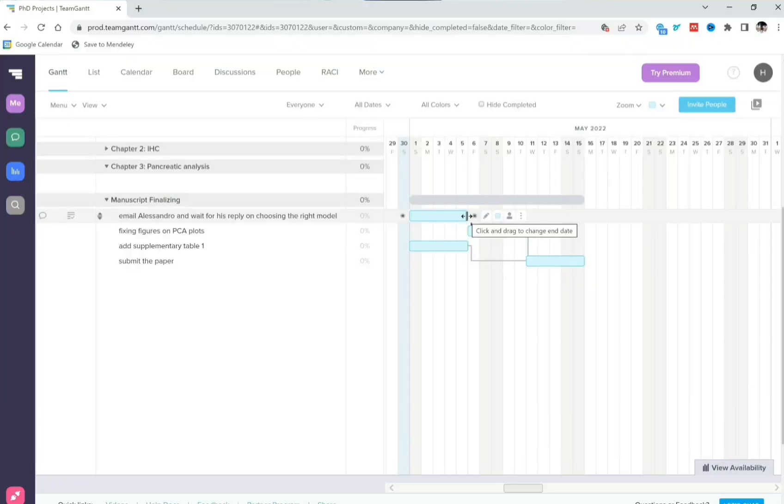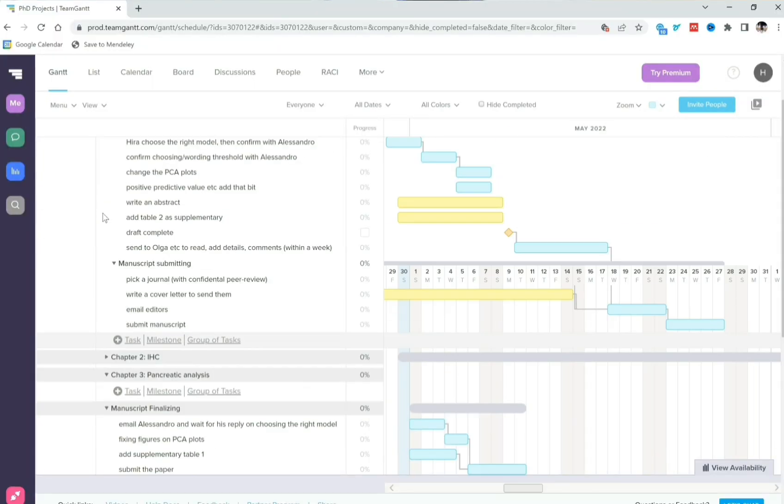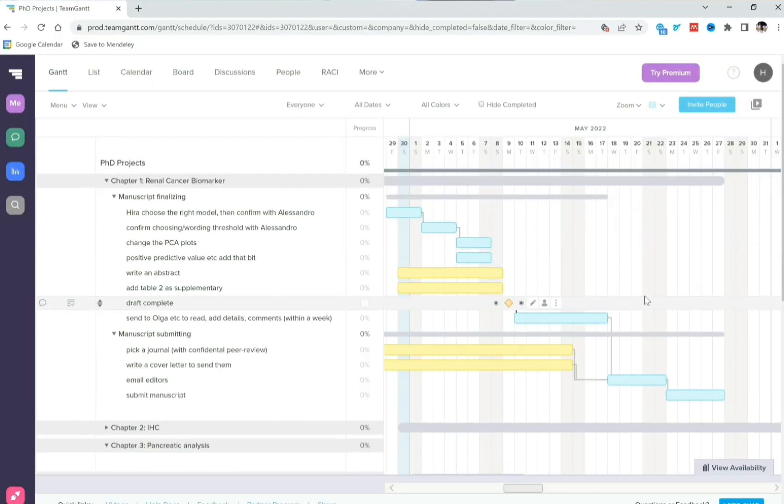The reason that's really important for research is that you can then have a better idea on which task is actually delaying the whole project and how much of an impact it's having on the final end date of the project. So I think one of my main issues with task management has been that a lot of times so many tasks depend on other tasks. So I will look at my task list and I'll say, why haven't I done this yet? And when I start doing it, then I remember, oh I can't do this because I don't know this or I'm waiting on this. And so you can actually trace it back to the first task that needs to be done before you can do all these other tasks, which are called dependent tasks.